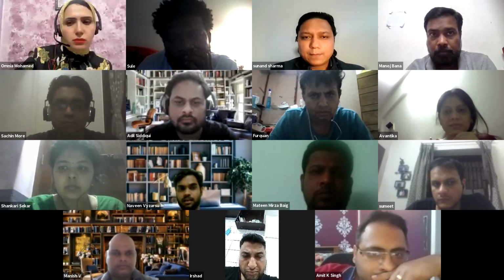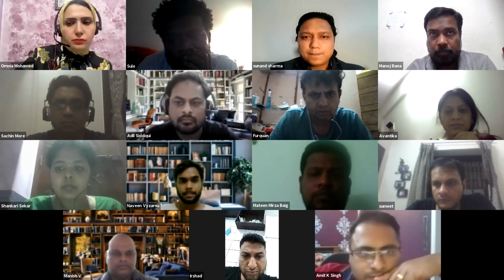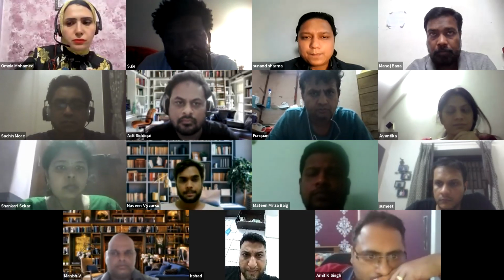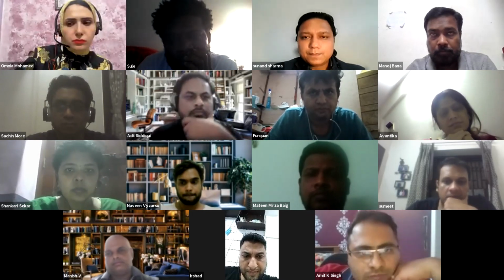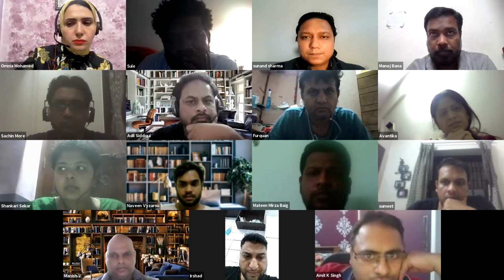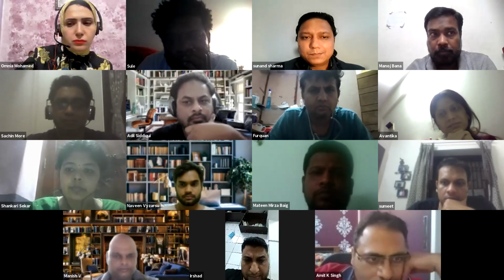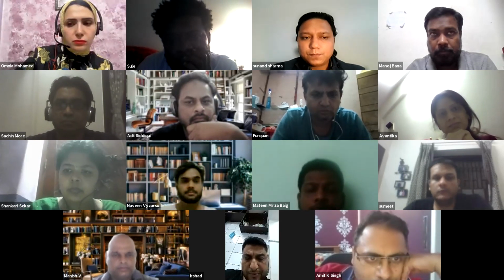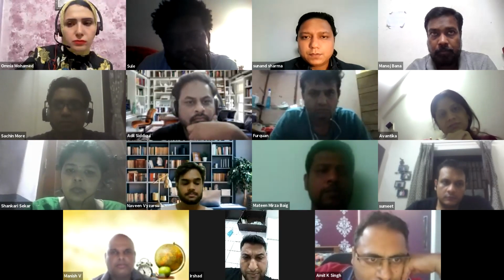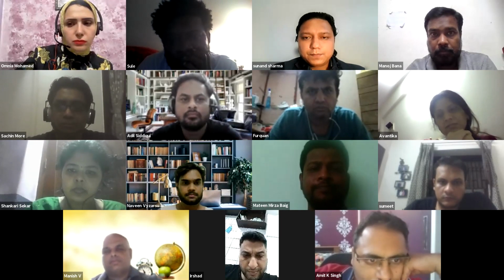Yeah, you can do it by Tempo. There is a Tempo plugin available in Jira, and you can do the costing through Tempo. So if you have logged your hours, let's say 3 hours or 4 hours, on the task or on the project, you can use Tempo. I've been using it. So you can use Tempo to bill directly. So you mean to say the burn rate can be calculated via this Tempo?